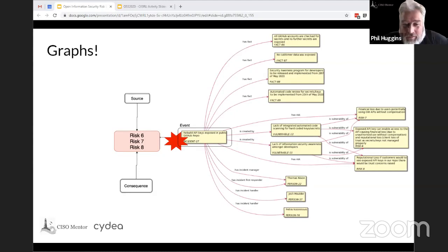So one of the things I have been thinking about, and I think is a huge opportunity, is that once we have the relationships between sources, events, and consequences mapped, and we use consistent language to describe them, we can go through our entire register and apply that to the statements in the risk registers. We can then start looking at where there are interdependencies. Assuming that the risks in the register are not all independent of each other but overlap, where those overlaps exist, where are the opportunities to invest in a control which attacks 5 or 6 different risks? I think there's huge opportunity there to use a graph to do that, rather than a risk register, a risk graph.